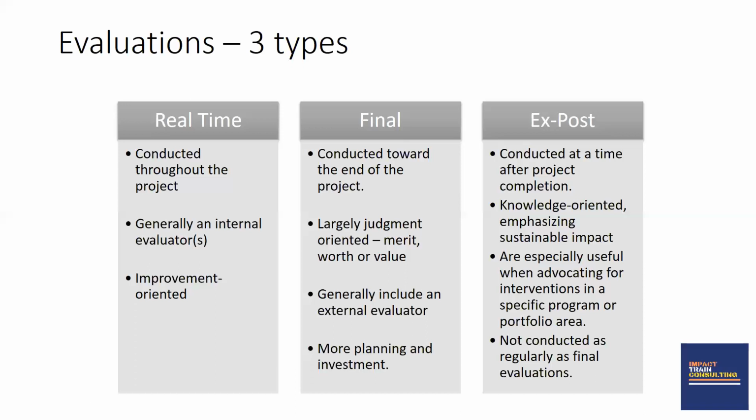And because you're passing judgment, it is generally conducted by an external evaluator, because you don't want your internal evaluators to come and show bias in the project. The final evaluation involves more planning and investment, so it has to be budgeted for in your budget during the identification and design phase. The ex post or post-project evaluation is conducted at a time after the project has completed.